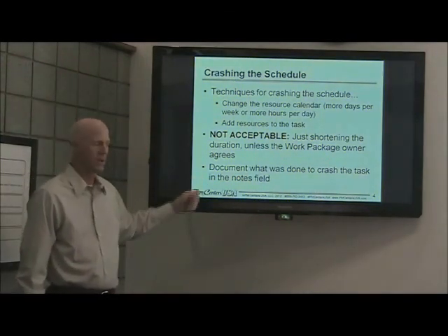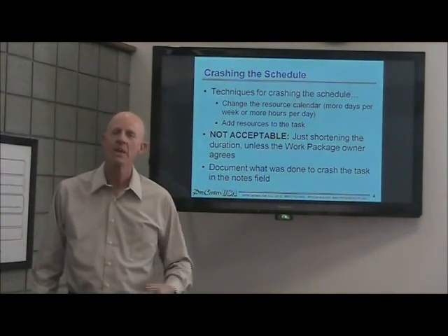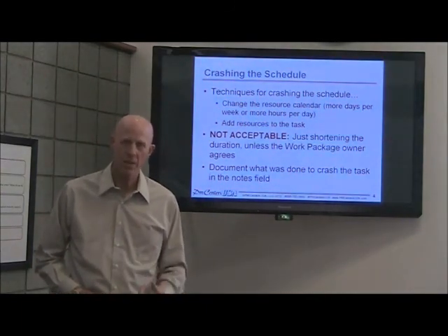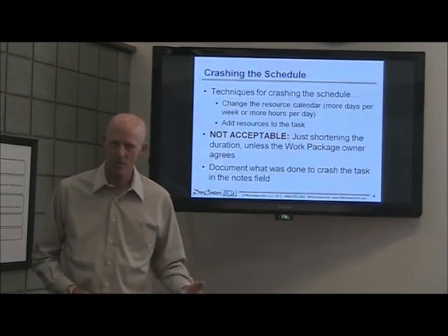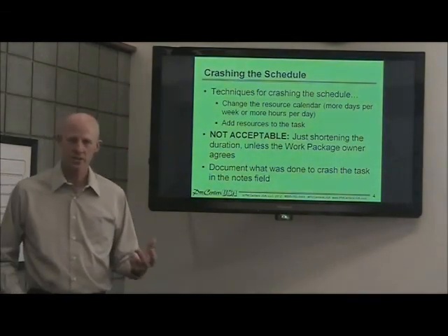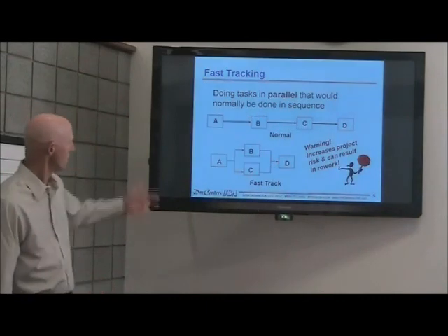Also, the other comment, I'm going to put a note here about documenting what you're doing. When you do scheduling, there is a notes field, and I highly recommend you use that field to document: we changed the plan, we added 3 resources to get this task done quicker. That way you have a history of the things you did to get the job done quicker, and again, it will come in handy.